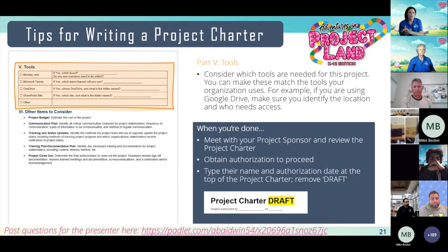Okay. When you're all done, you've crafted this gorgeous, beautiful charter, meet with your project sponsor and review the charter. Then you want to obtain that authorization to proceed, and you're going to put their name in that. I'm going to use my handy dandy laser pointer. You're going to put their name in that authorized by and then remove that draft piece because your charter's been done, checked, authorized for use, right? All right. Any thoughts or questions about the charter before I move on?